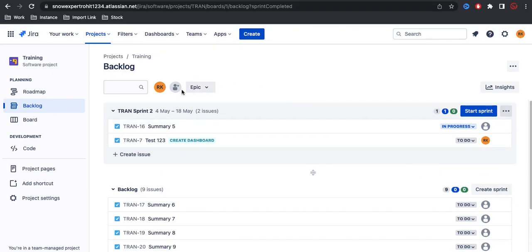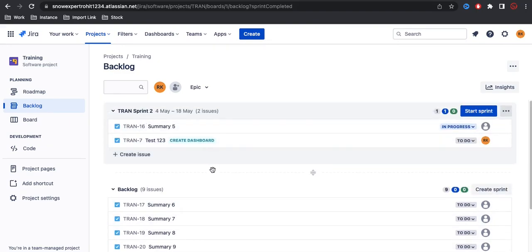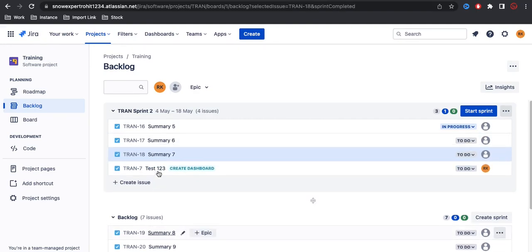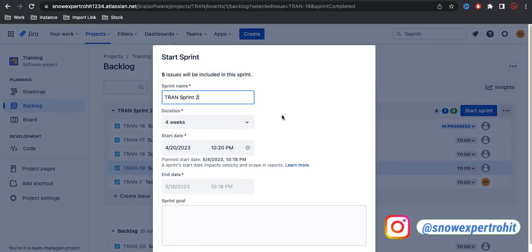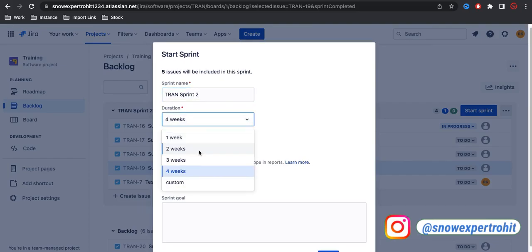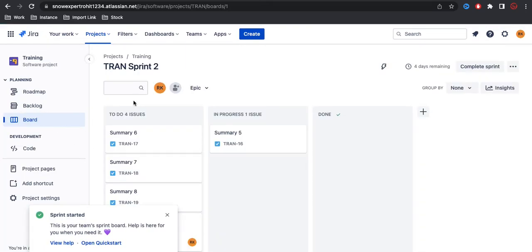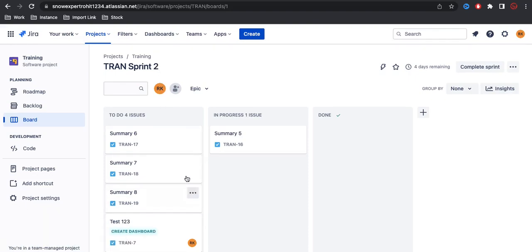Once complete sprint is clicked, we can see two stories are completed - that's fine - but two issues are still open. Let's say the scrum master decides to move the two open stories to the new sprint and clicks 'Complete Sprint'. It will redirect to Sprint Two, and those two stories are moved from Sprint One to Sprint Two. In the sprint planning meeting we decide a few more stories to complete. We click 'Start Sprint' and the new sprint begins. Under the board it will show Sprint Two with all its stories visible. That's it for today - if you have any questions, let me know in the comment section. Thank you very much, have a great day.